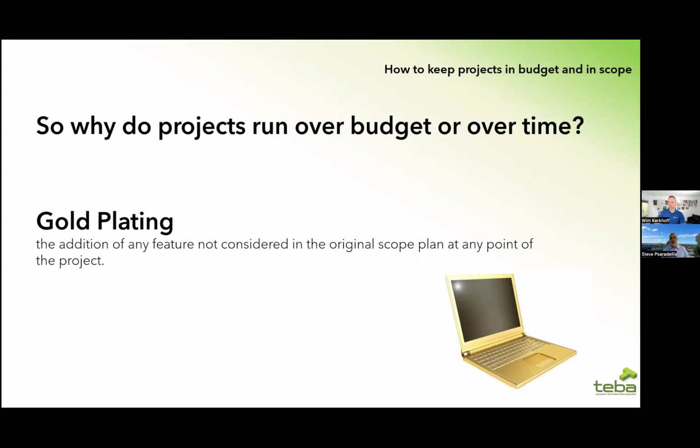Did that add value to the movie, to the project? Absolutely not. That is an example of gold plating, where people will go above and beyond what's in scope because they've got too much time to do something. And this ties in with Parkinson's law, so we'll come back to that.